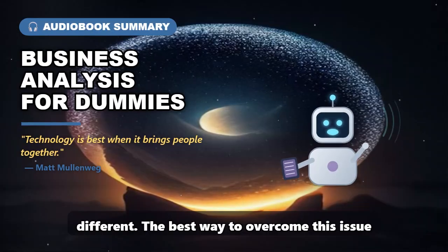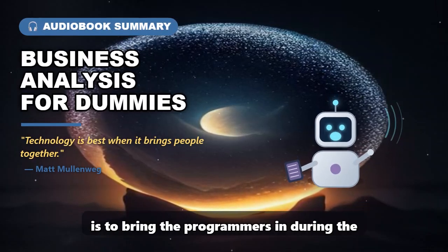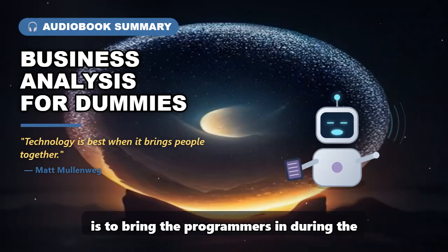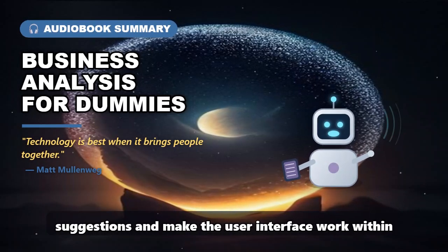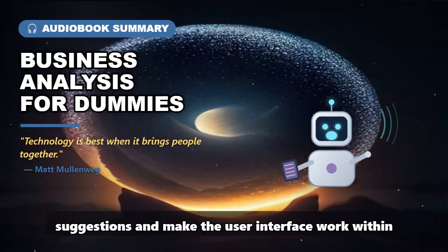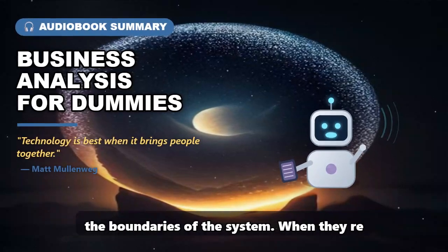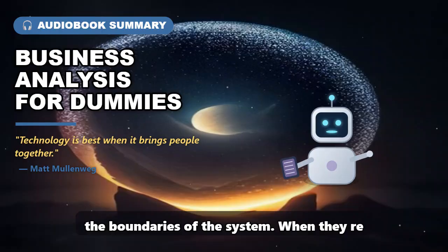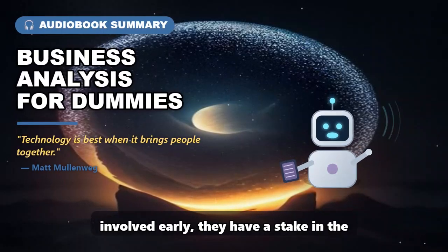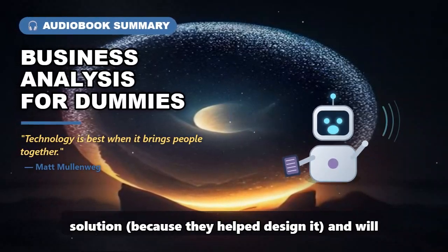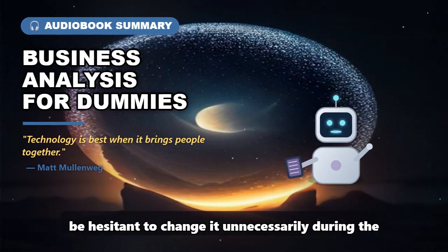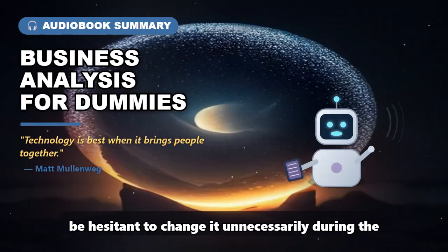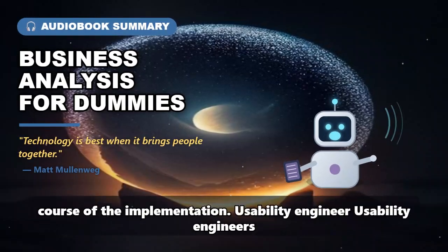The best way to overcome this issue is to bring the programmers in during the design phase or earlier. Then they can offer suggestions and make the user interface work within the boundaries of the system. When they are involved early, they have a stake in the solution because they helped design it, and will be hesitant to change it unnecessarily during the course of the implementation.